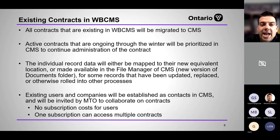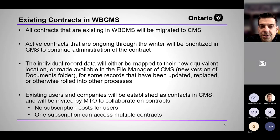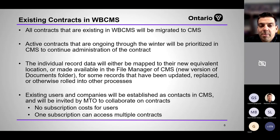A big question is what happens to existing contracts and data in WB CMS. All contracts currently in the system are being migrated to CMS. At go live it starts with priority active contracts that have active construction, followed by those starting up in the spring, then completed contracts — a phased approach. We expect all contracts to be in there with users onboarded for their respective contracts.